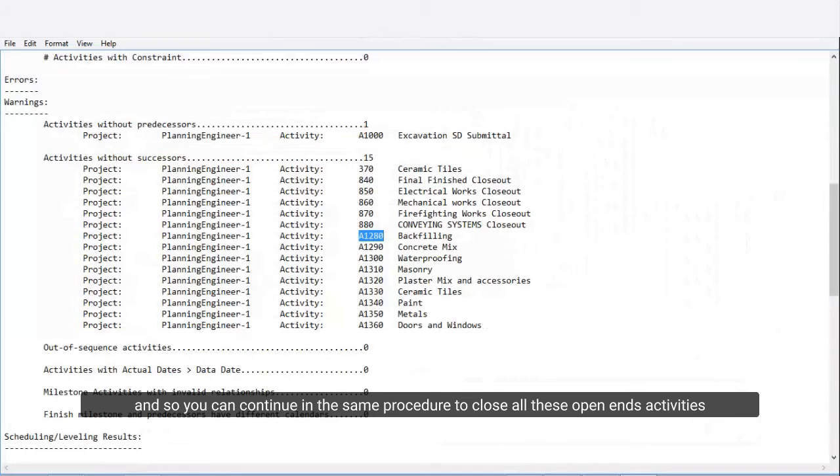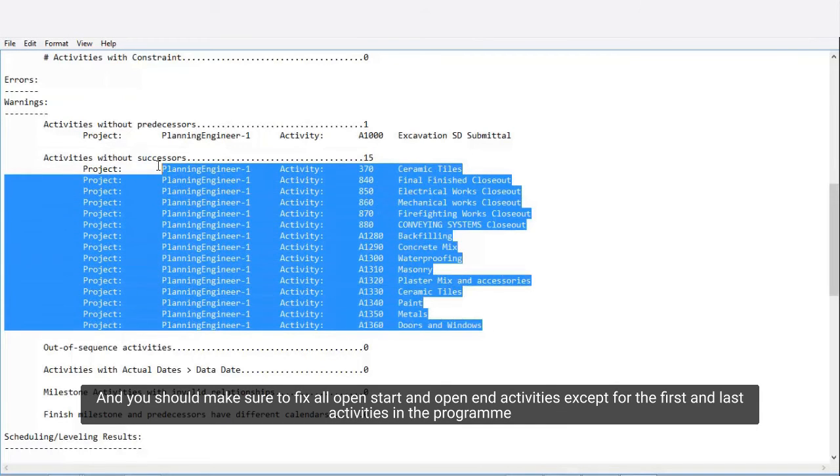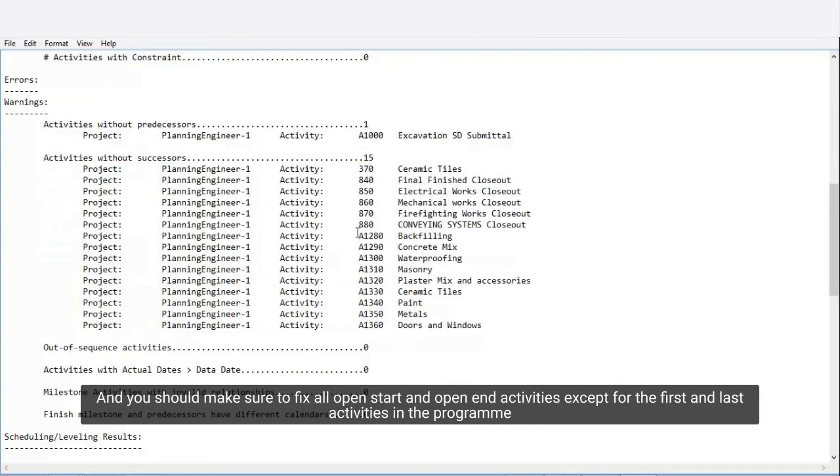You can continue in the same procedure to close all these open-end activities. You should make sure to fix all open-start and open-end activities except for the first and last activities in the program.